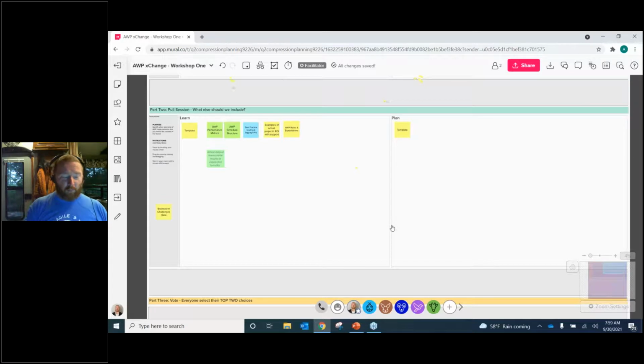What we want to get away from, and what I've seen done in AWP projects in the past with technology, is you get information from engineering and it's not complete. But instead of going back to engineering and trying to fix it, the service provider like O3 or equivalent spends their time trying to augment that information. The best thing we can do for all of us is get that information early enough and go back to the engineering contractor and make sure they understand what we need and what they need to do to get that working for us. Does that answer your question?